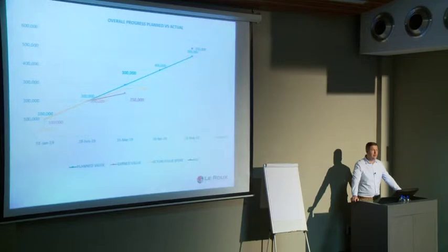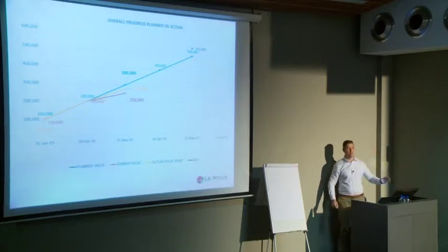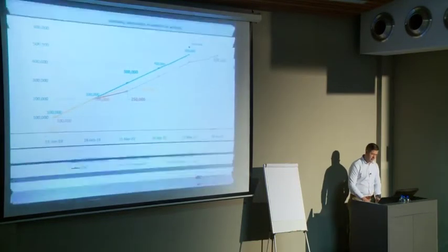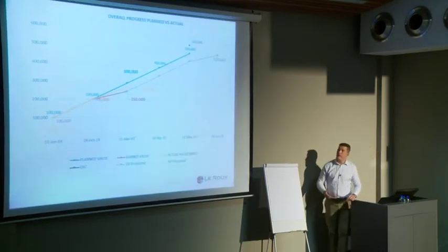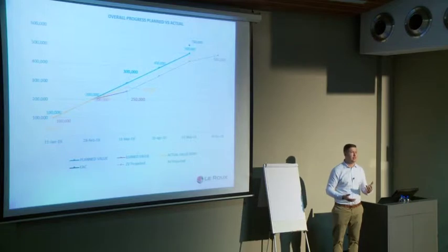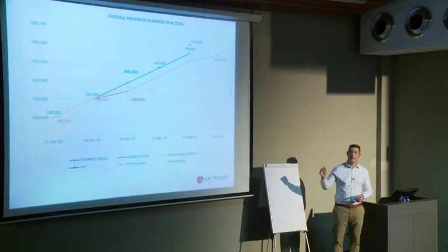Good. So we are behind. Budget, will we still finish under the 500,000? What would answer that question? What metric? Estimate at completion. Yes. So if we do a projection from here, because we are late, that 250, the earned value, tells us we are late. You agree? Because it's less than what it should have been. We should have been at 300. We're not. So we know we're behind. So even though the spending is lower than the plan, it's still higher than earned value.